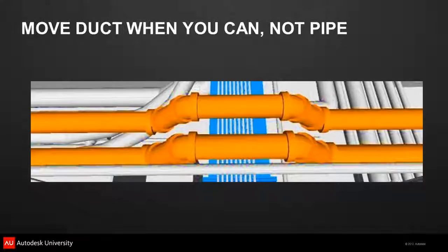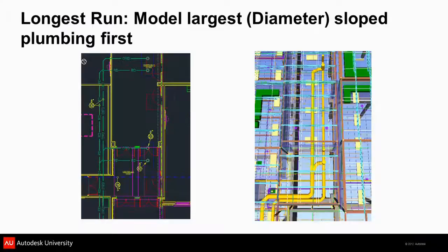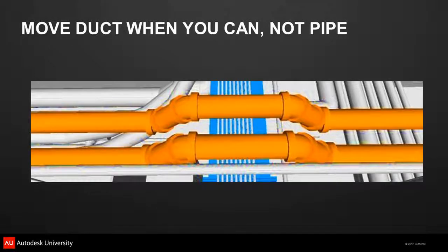We've been on projects where the groups doing the large bore pipe didn't talk to the ones doing the ductwork. Two groups modeled simultaneously. They were looking at each other's models, but they added a bunch of fittings when they could have just moved some ductwork around in places. That experience really wins the day.